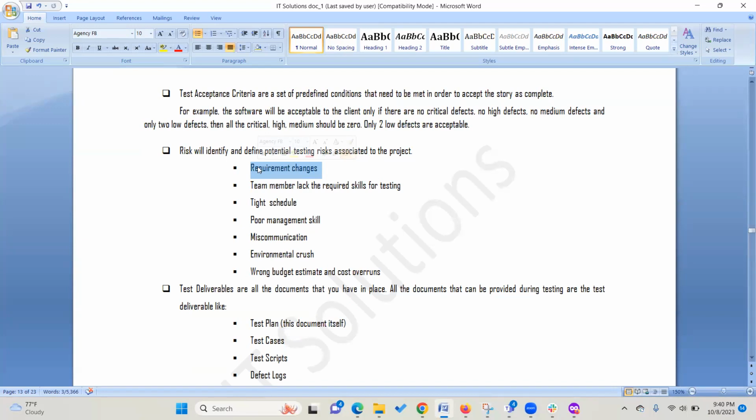I don't know. No, it's not riskier. It's not riskier because changing requirements in an Agile environment is common, and that's why they adopted Agile. So it's a known thing, and that's something when you do your planning and estimation, you need to keep some extra time for those kinds of activities as well.